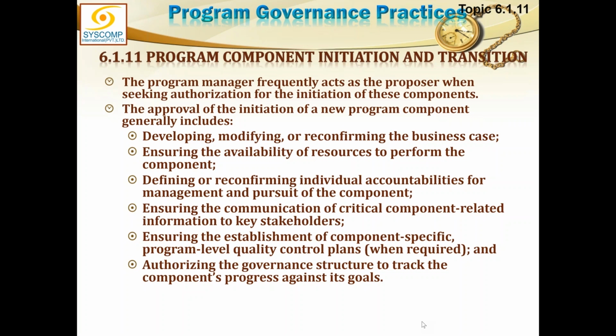So you will create your own plans for that and let the project manager do his own job. He will create his own quality control, quality management plan and everything. That is the project manager's business. But your business is the program level quality control of each component. How are you going to do it? So you will have your own metrics. The project manager will define his own metrics.